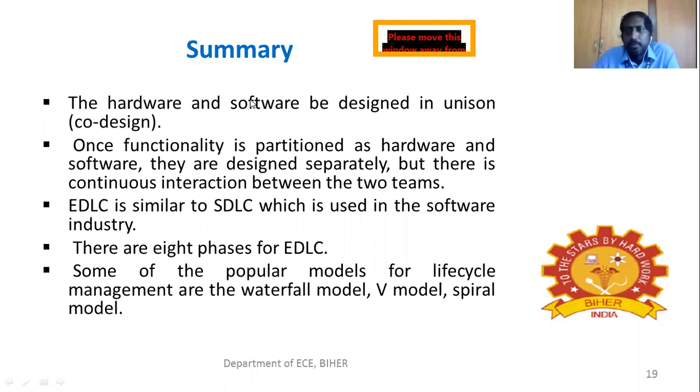And then we discussed the popular models such as the Waterfall Model, and then Backflow, and then the verification and validation model and the spiral model. In the Waterfall Model, there is no chance to go to a previous phase. It is corrected in the Waterfall Model with Backflow, and then the V model, where at each stage we verify and validate the systems, and the final spiral model provides iterative prototypes which are suitable for innovative systems.